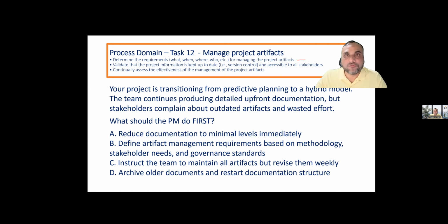That's why we say that we have to clearly establish the RACI matrix, that who needs to be responsible, accountable, to be informed, to be consulted, who will communicate. All the risks, roles, and responsibilities should be assigned. You guys remember in which document we mentioned who will do what? The roles and responsibilities are assigned in which document? They are assigned in the resource management plan.